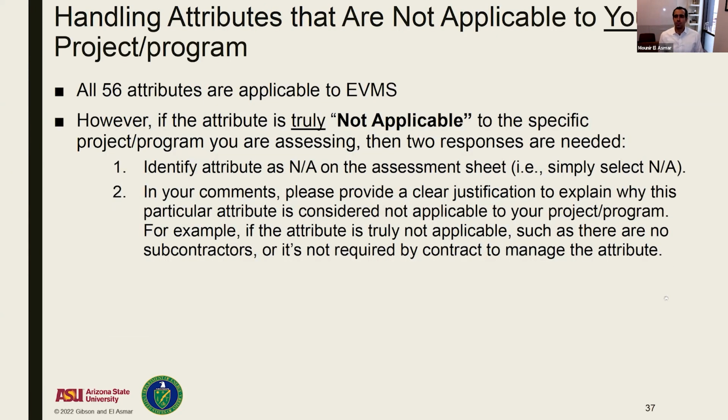Ed also mentioned NA, right? That last attribute that he went over, H5, around unit cost, was not applicable. And notice what he did there mentally. He took these 8 points out of the total, right? It was out of 51 as opposed to being out of 59. And that's basically how NAs are handled calculation-wise, and that's what the software does.